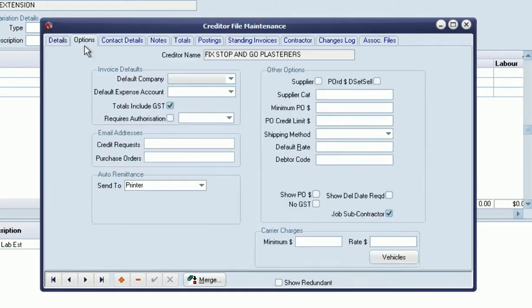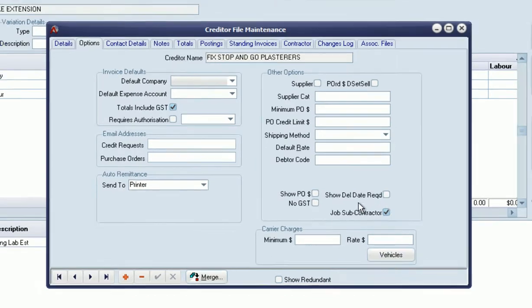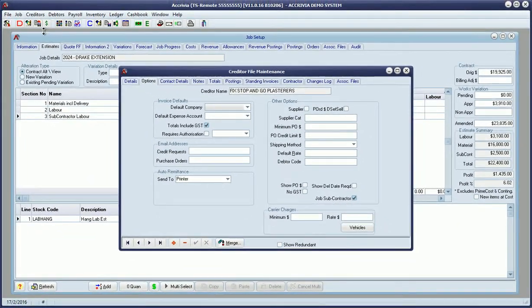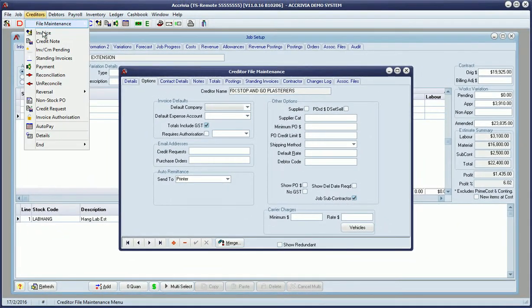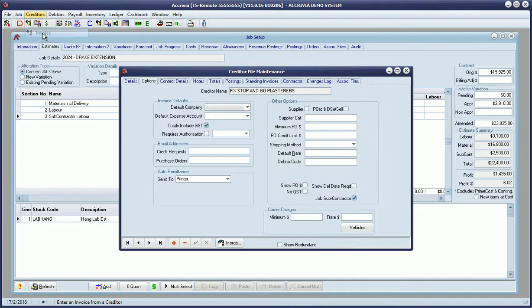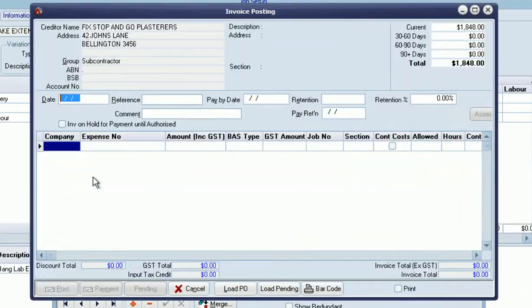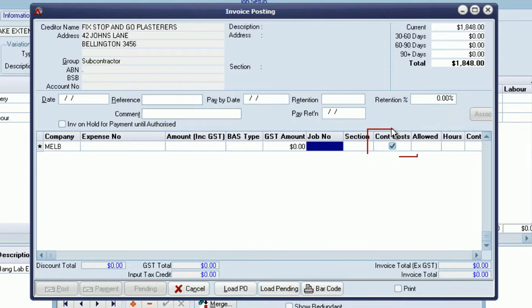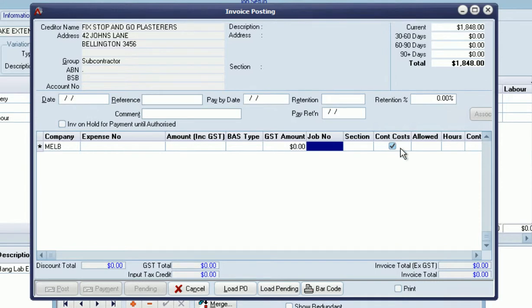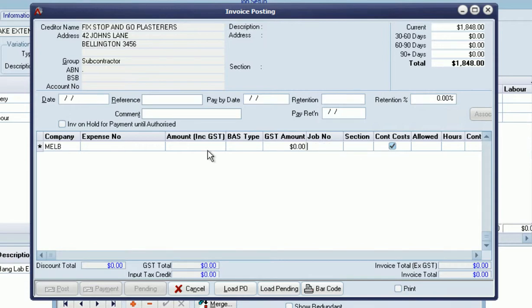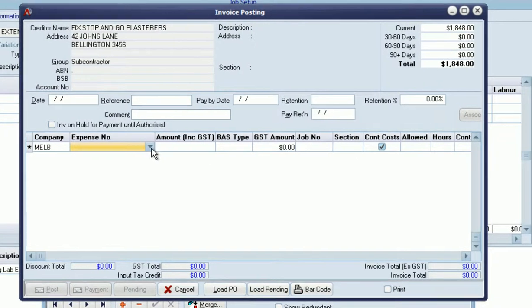The inclusion of this tick means when creditor invoices are posted in the system, a new column in the creditor invoicing screen for contractor costs will be set by default. You can override that. It's possible you'll have a supplier who is also a subcontractor, providing materials as well as labor costs to the job. Some invoices may have that ticked and some may not. We may have different lines on one invoice, and in each case you'd allocate to the appropriate jobs.